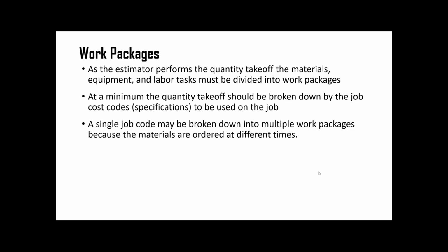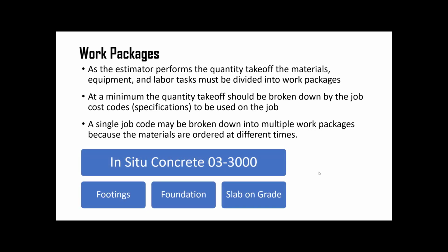For example, if you are looking into placing concrete, placing concrete might be a single item, but it can be done in footings, foundations, and slab on grade. These three events happen at different points of time in the project. So this can be our work package. Placing concrete can be a work package, and we make the takeoffs according to the work.